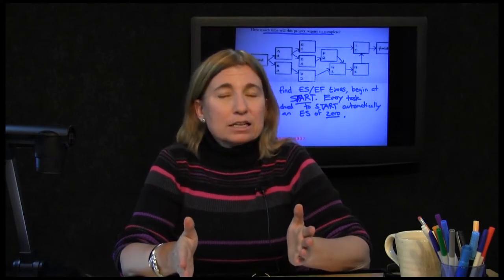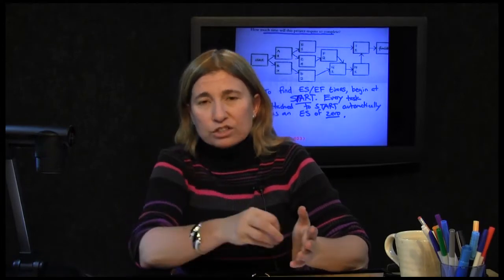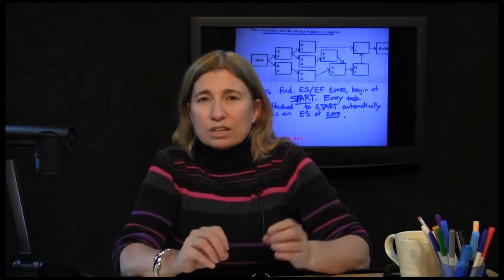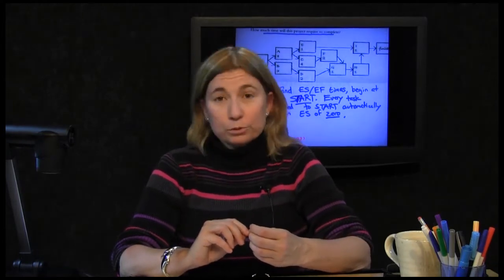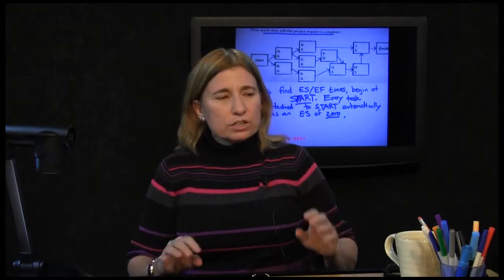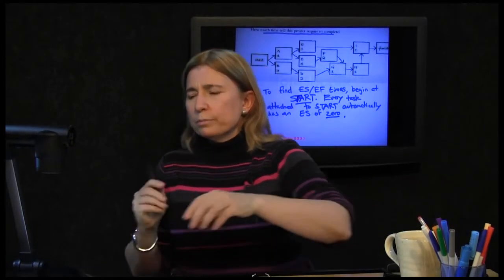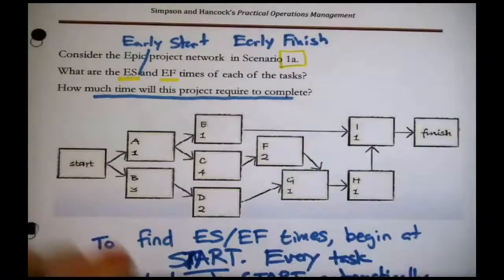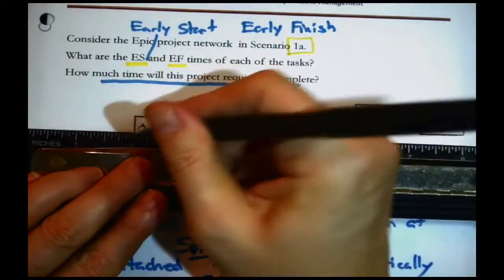If a task is attached to the starting node and you're in a hurry, the fact that it's attached to the starting node is telling you you can start on it right now. You can start on it at time equals 0 at the earliest. Oh, all right. Now, this is going to get us started in determining the timing for all of those tasks, but something we ought to do is kind of get set up for those calculations so they stay organized.